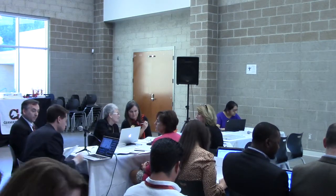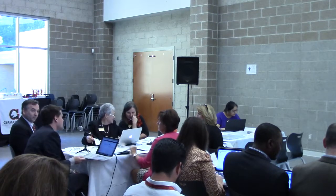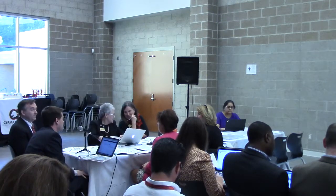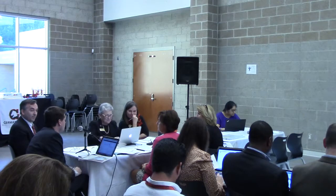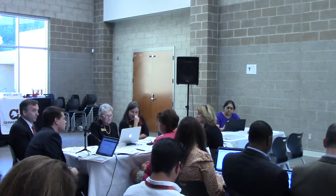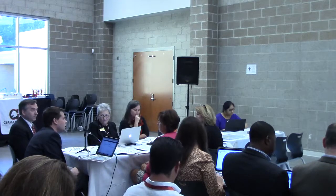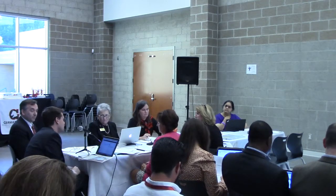As it relates to this item, which is the Fleming proposal, I met with Mike Perry and Dave Nishowitz last week. They were just seeking guidance on the field house and what the process needs to look like. I laid out that the Fleming proposal is over $100,000, the architect contract would need to be with the school district, and the building is going to be built on our property. So the first step is to bring this to the board for approval.